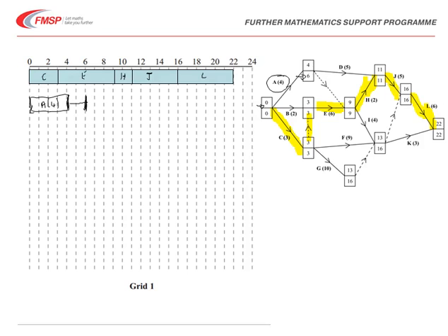So taking these one at a time, B can also start at 0 here, it's length 2, duration 2, and it has a float time of 1 because it could finish as late as time 3. D is the next one to look at.